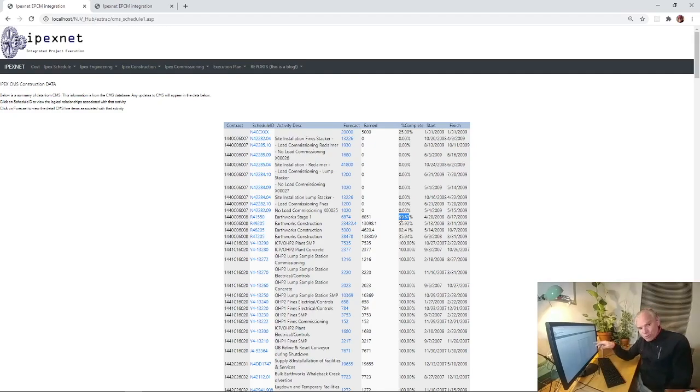But if you directly import this into your construction schedule, your activities are just going to keep floating out, and you're going to end up with schedules that look like bars that just go straight across, and you get no heads or tails of what the link between these is. What you need to do is take something that's coded underneath the schedule ID, this R41550. You need to go find one of the scope elements, maybe pull the one that's not 100% complete out, and map it to a different schedule ID that might be a remaining scope item. So you might have to change your schedule, but that's exactly what you want to do to give good granularity into your construction data.